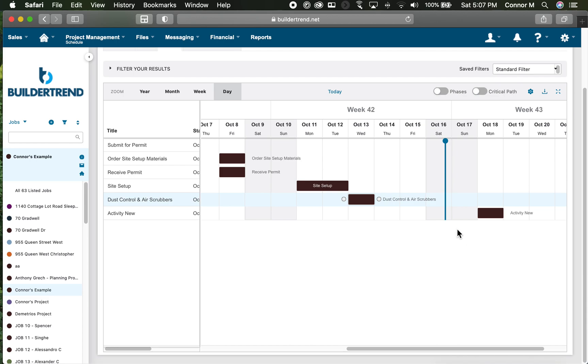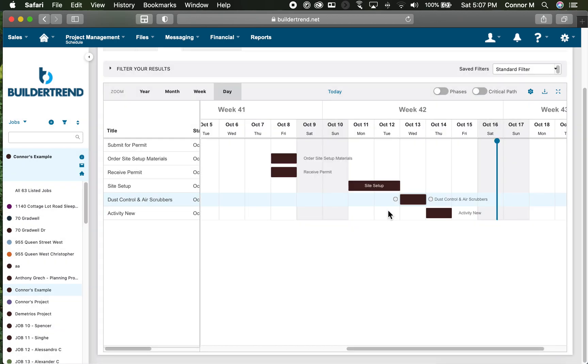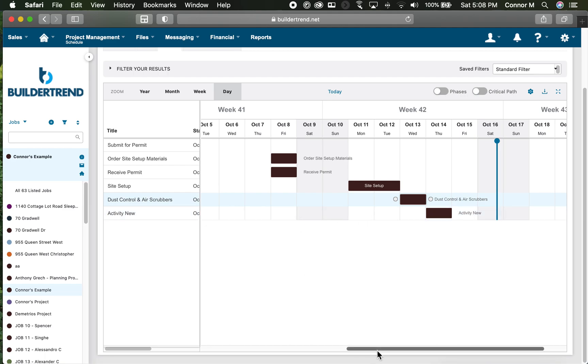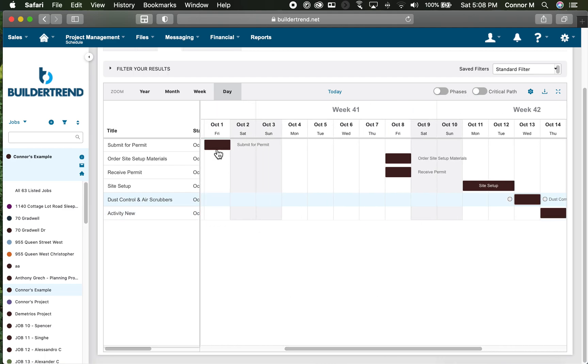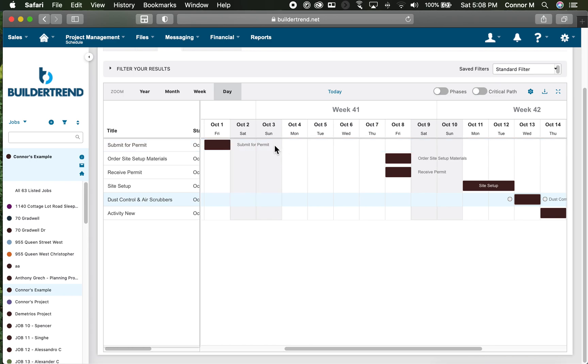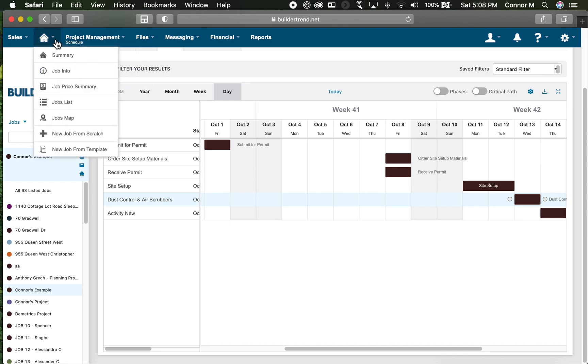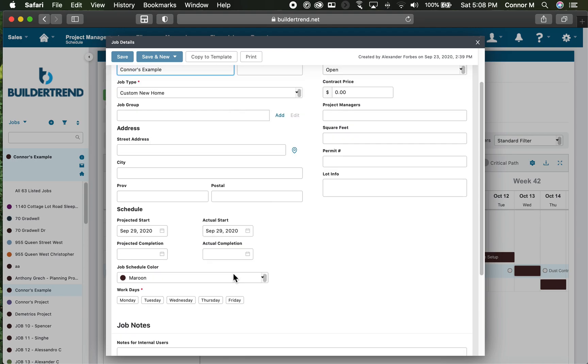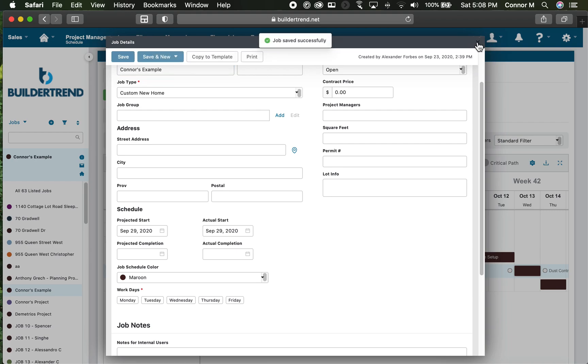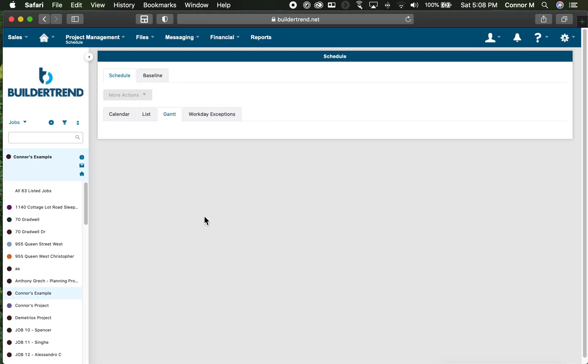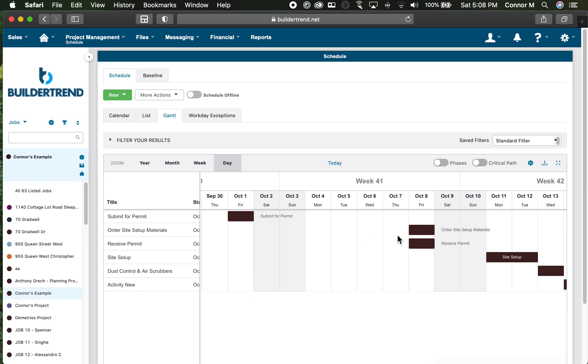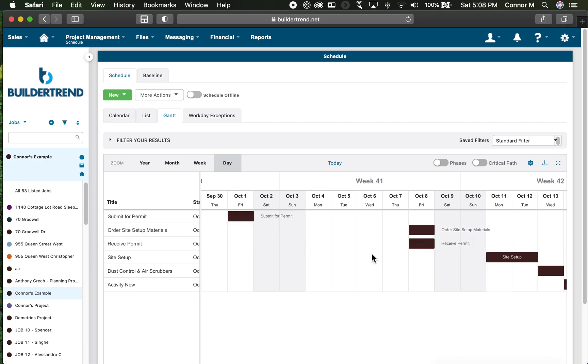When you add all these things, you want to move the activities roughly into order for how they're going to work. I've set my schedule up to start on Friday. I have told BuilderTrend that I do not work Saturdays or Sundays by going into the job info and under working days I've said Monday to Friday. So I have my activity on Friday, I submit for permit, I receive my permit the next Friday, on that day I can order my site setup materials.